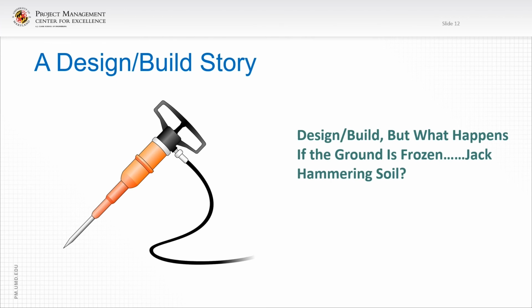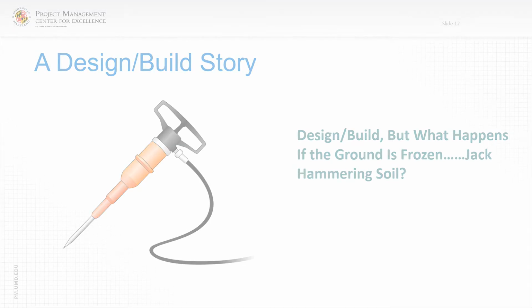The owner was not in any great rush and gave us a 2-month time extension. We waited until the spring and then we got started. And this was a design build contract that was very, very successful and had very, very few change orders. So keep in mind seasonally when a project begins, because that can have a big effect, not only when you start, but when you end.